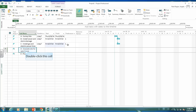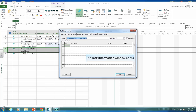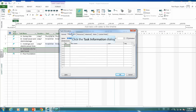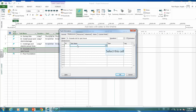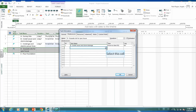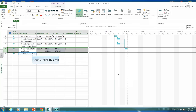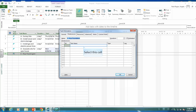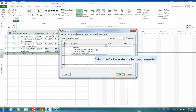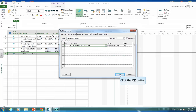D has predecessors B and C. Let's click on activity D, go to the predecessors tab, and select activities B and C, then click OK. E has predecessor D, so let's select D and click OK.